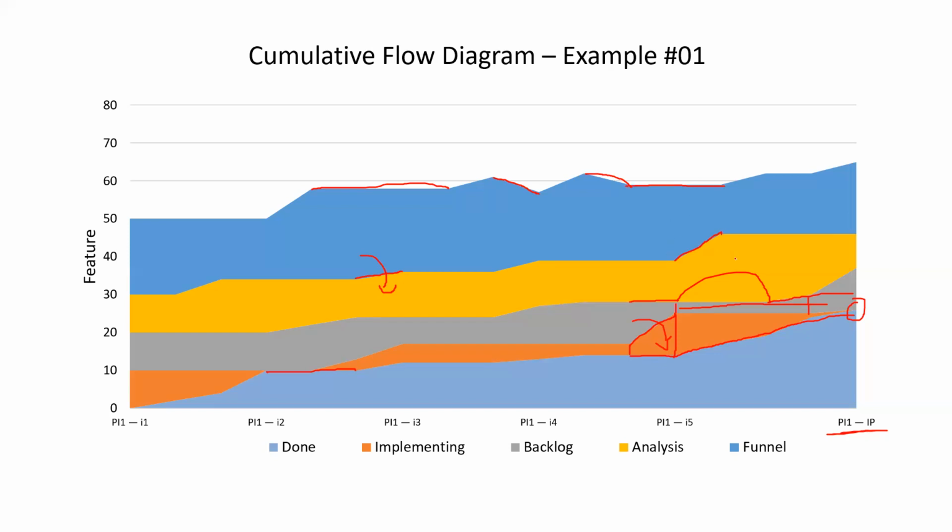The issues move from funnel to analysis. So this line will get reduced. Okay. Fine. So the funnel remains the same. The number of issues in the first stage remains the same, but the issues are getting moved to the next stage. That's why this gap is getting reduced.